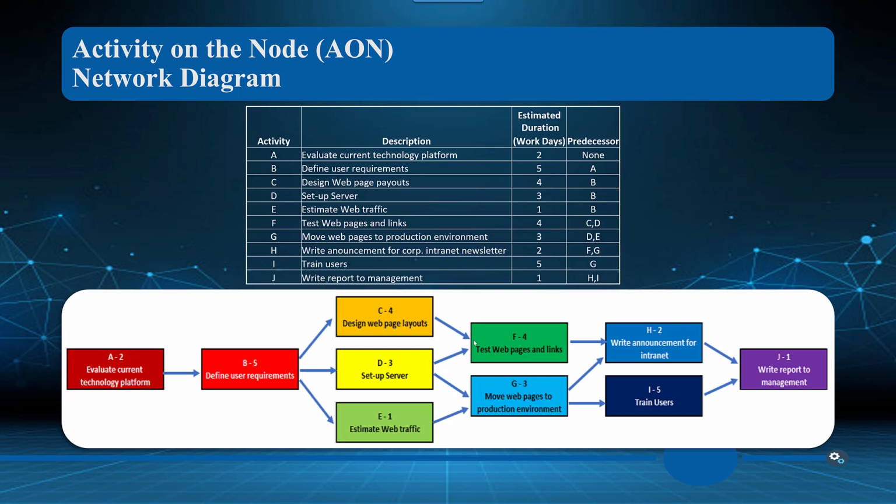And we can actually start the testing before the design and the setup of the server are complete. Okay, so maybe there's some prototype or storyboard testing that we want to do before we test the actual software, the actual pages. In which case, what I sometimes will do is put a gap here, put these in there so that we can see that there can be an overlap. Okay, but there's still going to be some predecessor. We're still going to want to have these arrows.